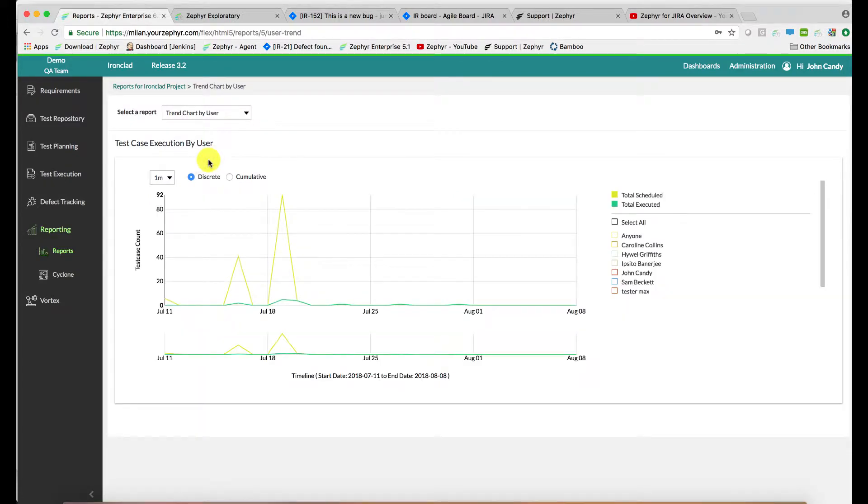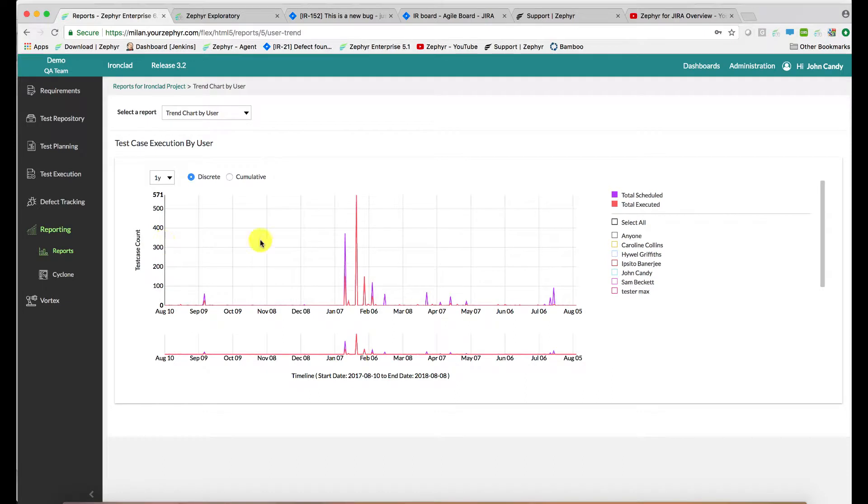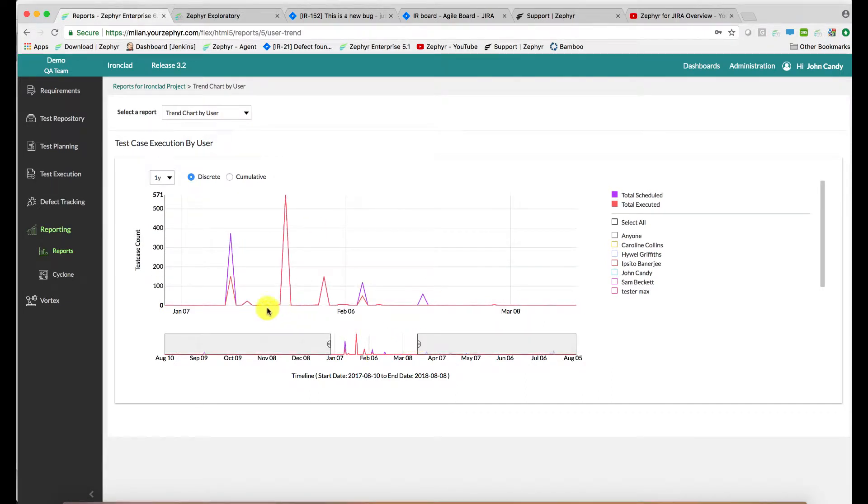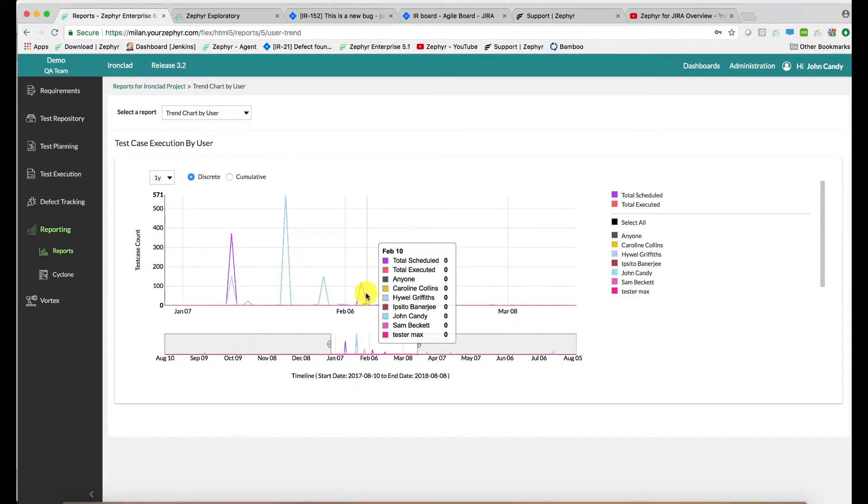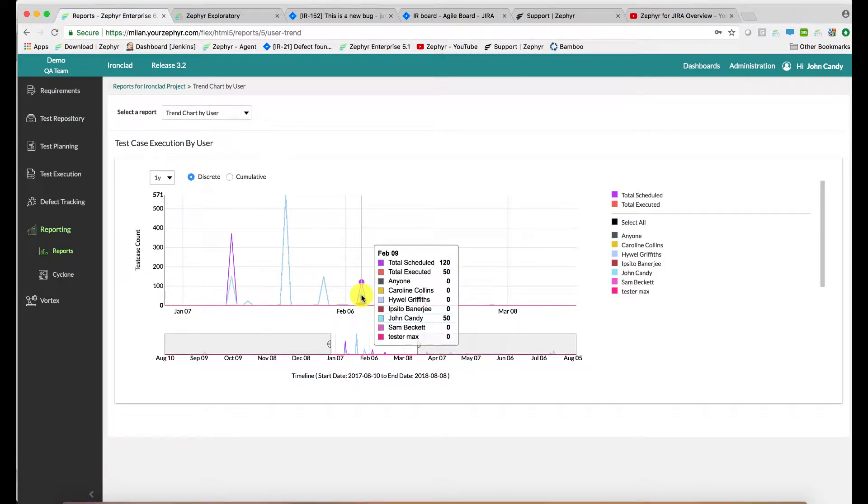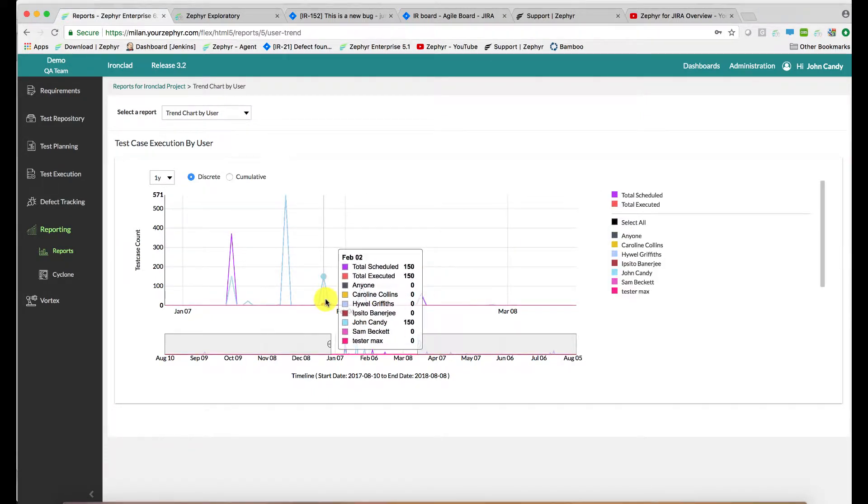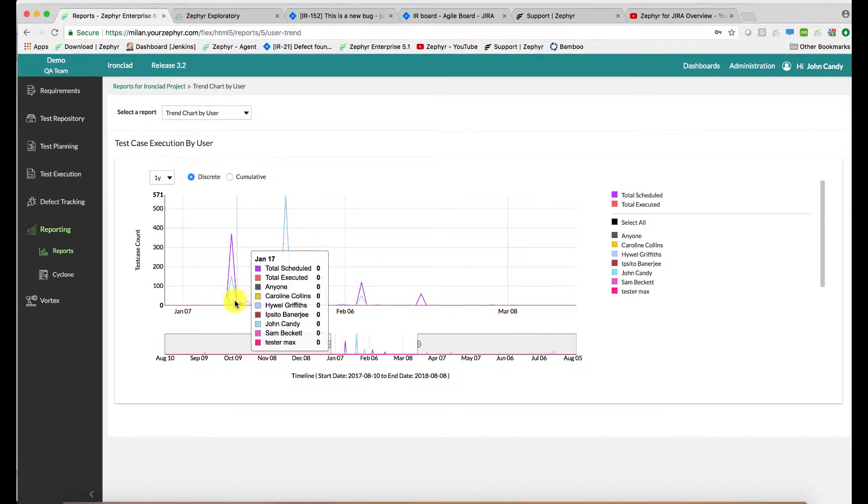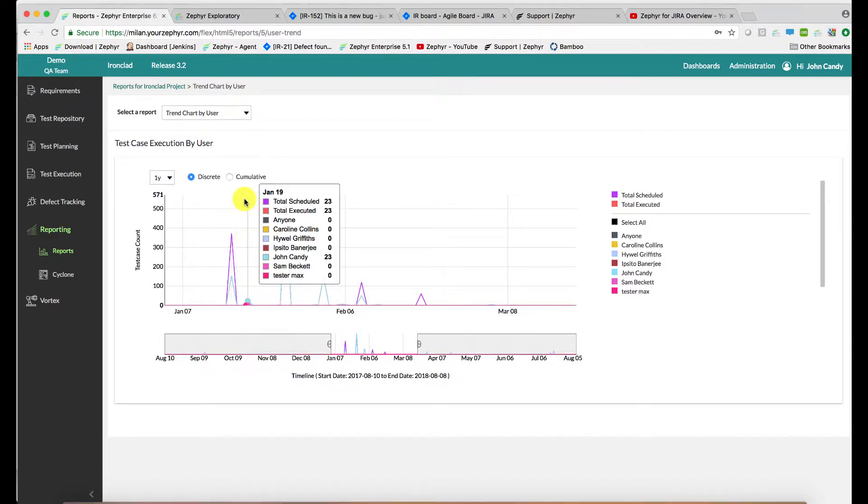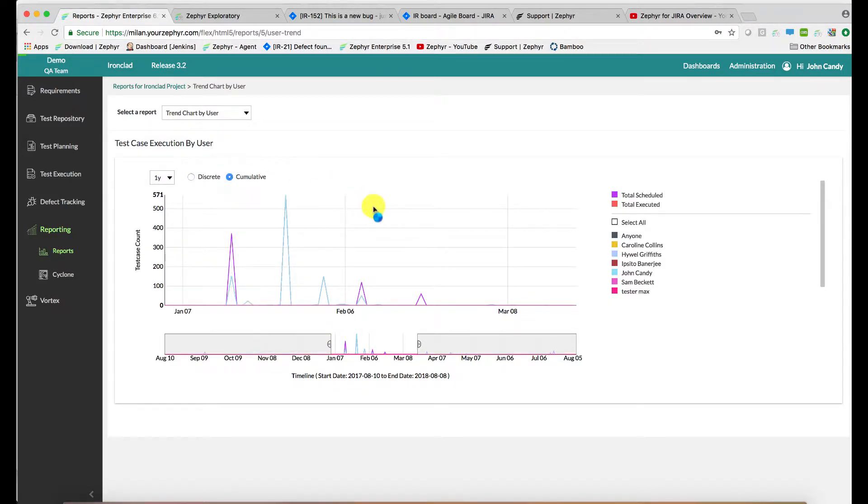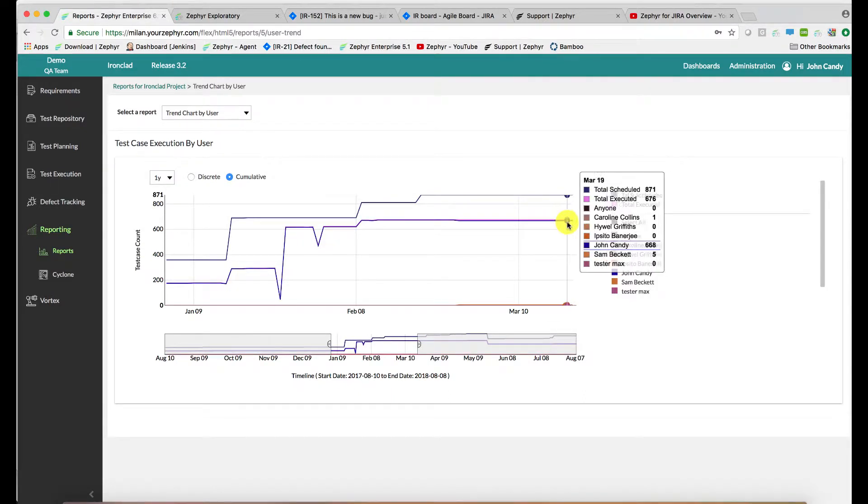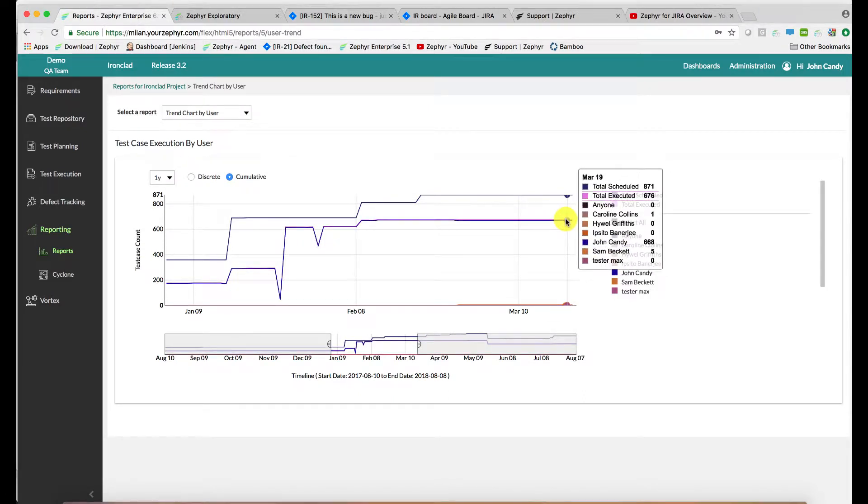User activity or test activity can also be assessed using the trend chart by user. Again, we restrict our timeframe here at the bottom, and then we select our users, which tell us how much testing is being done by all of the users. The cumulative mode tells us the contribution made by each of the testers towards the total executed amount.